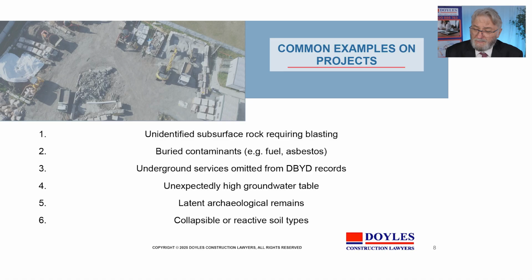Again, unexpectedly high groundwater table can cause enormous difficulty. Perhaps you're constructing a tunnel, perhaps a deep excavation, a car park. If you have unexpected water ingress, you'll end up in a difficulty. Archaeological remains, if you happen to come across some sort of historically valuable remnant, then of course your project will be stopped for large time and at large cost.